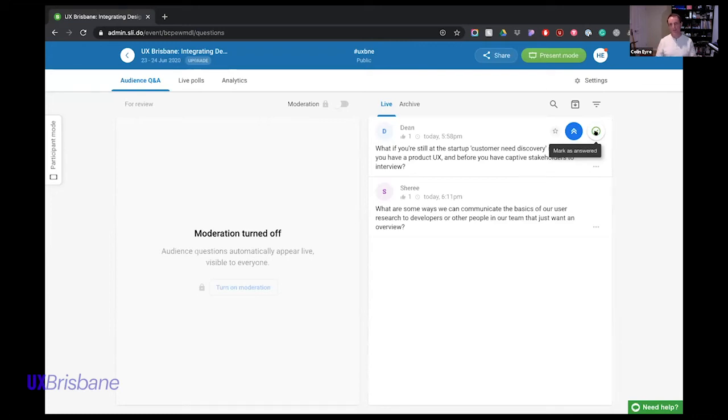Okay, I don't know these things. We've ranked them. We've talked them through with the stakeholders and the head of product. Out of these 50 things, these 3 things are the most critical things we need to solve or have an answer for. So it gives you that lovely pivot to, okay, I know where I need to go. And you can do a knowledge share canvas a number of times through a project. It's not always a one-off thing. It's something that you just do as a practice, as a team.